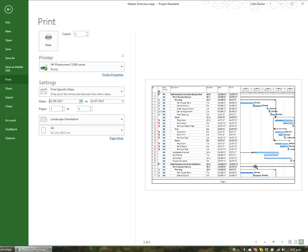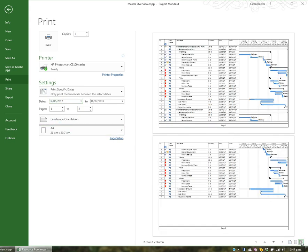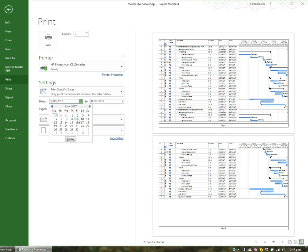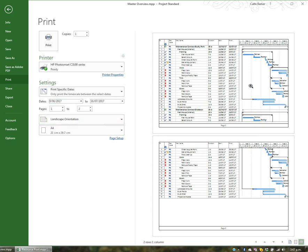That's brought it in a little bit, and viewing all the pages we've cut it from four pages down to two. But it's just a little bit too close on the twelfth, so let's change it to maybe the ninth. And that looks better — the beginning of the Gantt now has a little bit of a gap where before the gap was too large. So now I can see the columns I want through to finish, the timescale is showing nicely, and I'm only printing on two pages instead of six or four.